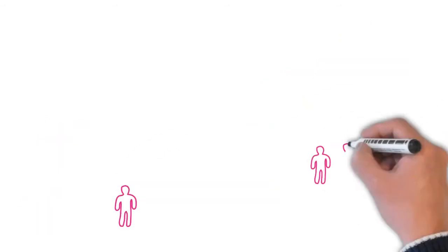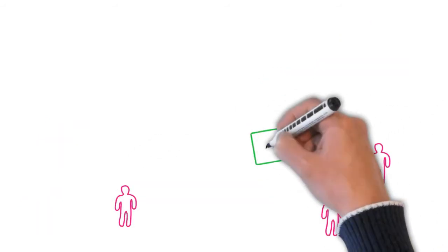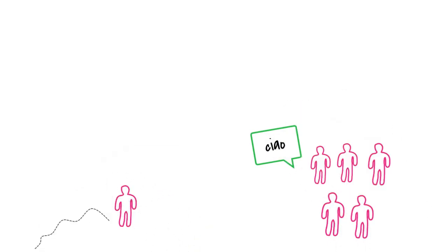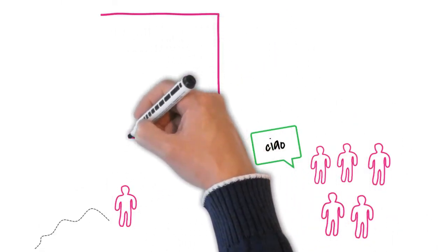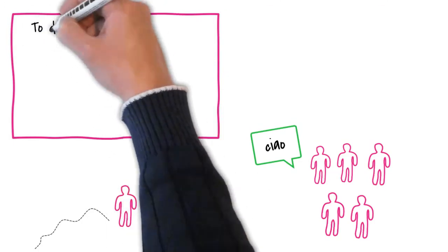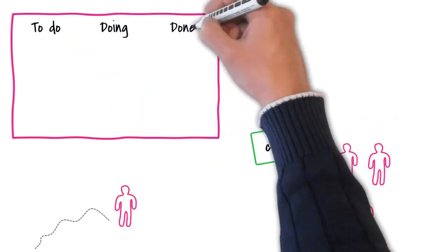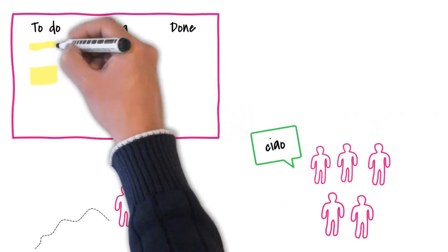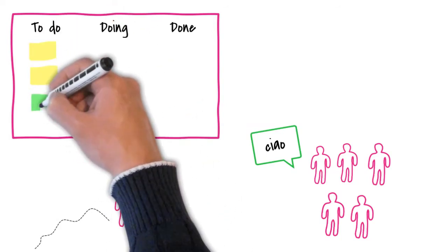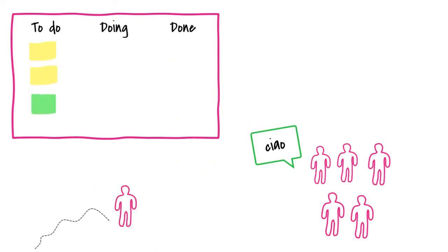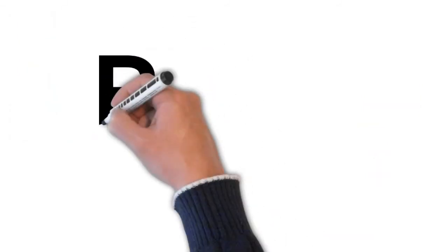Once this has been agreed, in our sprint planning sessions, we often like to release the product owner at this stage to enable the team to do some more detailed planning. Who's doing what? What are the more detailed tasks that need to be done to deliver the most pressing user stories? That kind of stuff. For the Scrum Masters in the room, it's really important not to take over here and do the work for the team. Remember, it's their work, so encourage them to wrestle with what actually needs to be done. So I think that's it.